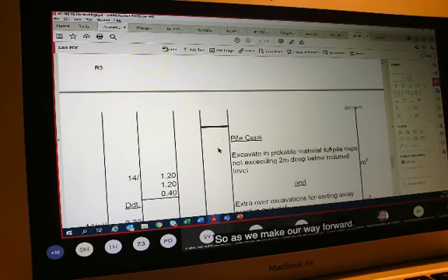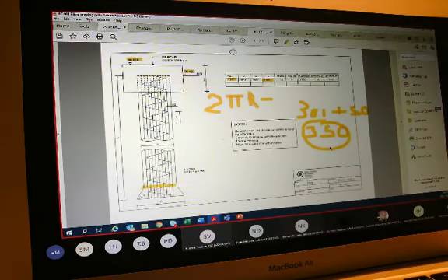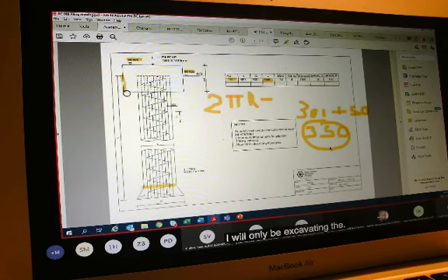Right? And you have 14 of those. And that is to determine the length of my spiral. But it also is important that we do not forget to indicate that all of this will be measured in tons. As per the standard system, that tells us that the steel will still be measured in tons. Okay.